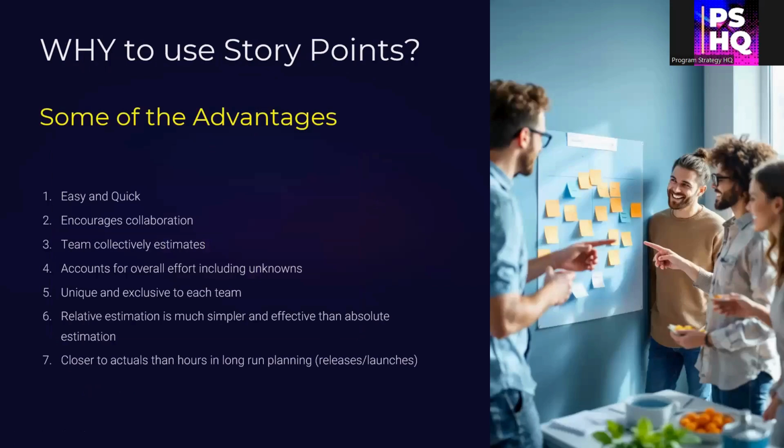Moving on to why to use story points. Here are some of the advantages. Story points are easy and quick compared to the estimation we used previously, which was absolute estimation in hours. Compared to that, this is very easy and quick. In a short refinement session of half an hour to 1 hour, we can estimate multiple stories. This encourages collaboration, where the team collectively estimates. Everyone together discusses, aligns, and comes up with the story points. Here we include not just the effort, but also complexity, risks, dependencies, and unknowns.